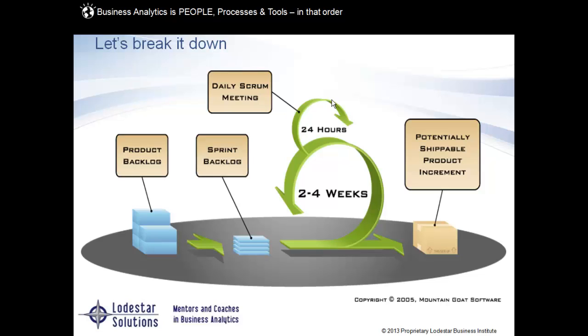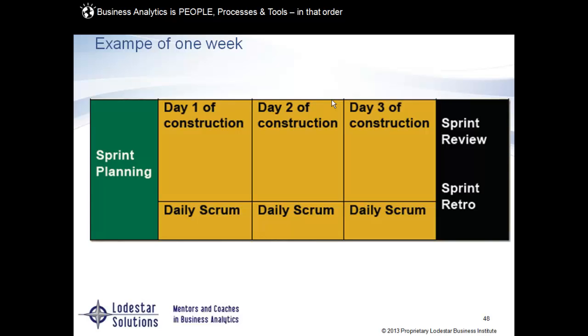At the end of each sprint, you will have a potentially shippable product. That could be a piece of 5 different things. I finished piece 1, and that's fine. In the next sprint, we're going to do 2 and 3. In the last sprint, we're going to do 4 and 5. But it is designed, the requirements are done, it is built, and it is tested within that 2-week period of time, or whatever my sprint period of time might be.